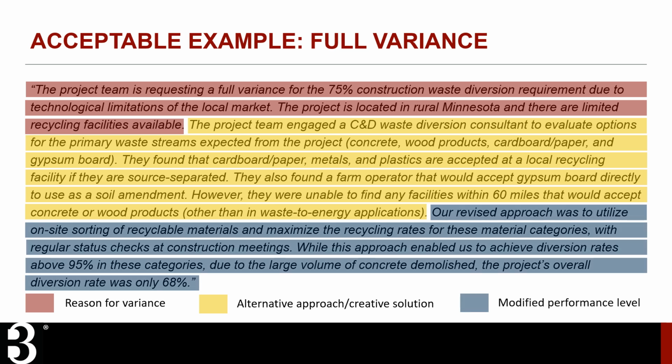Lastly, they identify their modified approach and performance level, maximizing recycling rates for all waste streams with local facilities or markets through on-site sorting and regular status checks at construction meetings to achieve high diversion rates for these materials, though not meeting the overall B3 diversion requirement.